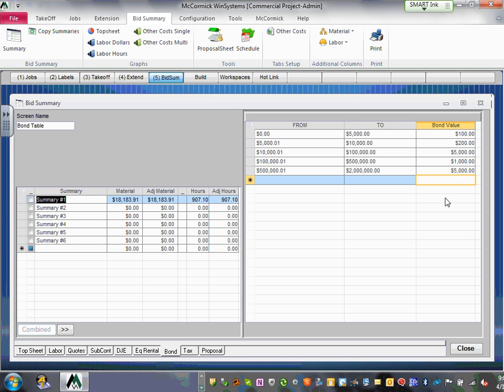What they do, they take these values based on your bid, guys, and they allocate it at the beginning, based on where you are. They allocate that value to your bid because this is money you need to borrow. It's like insurance, right? You have to allocate it for this particular project.